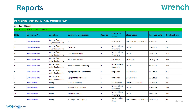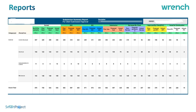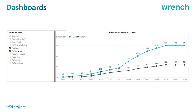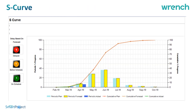Wrench Smart Project generates automated reports in real time — the information is always captured from the system so you can get the latest report at any second. Dashboards are created using Power BI and can be customized to suit your requirements. You can generate trend analysis dashboards, EDDR reports showing which drawings are forecasted to reach a certain progress stage based on rules of credit, and automatically generated S-curves with traffic light indicators highlighting drawings not progressing as per plan.